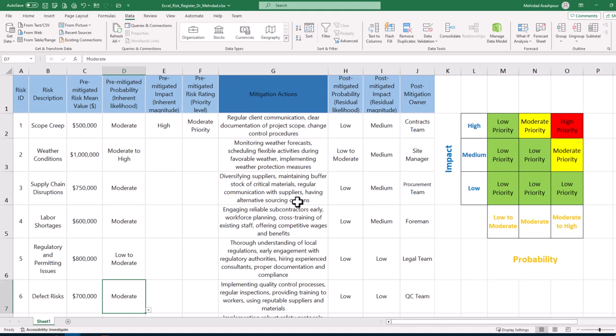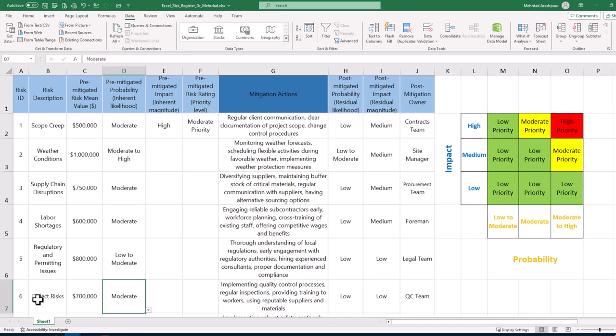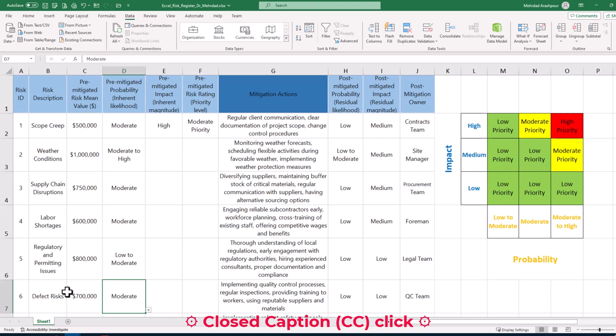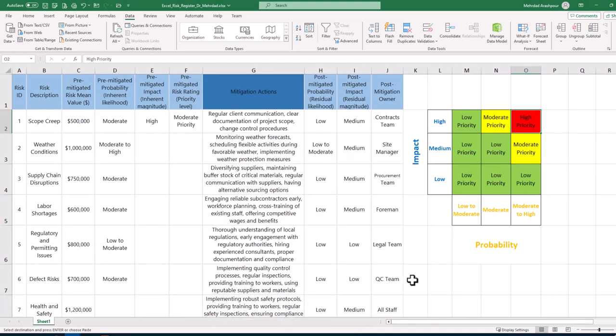This concludes the second step in building our dynamic risk register in Excel. Step 3 is to automate the calculation of risk ratings in the project risk register. So far, we have built the backbone of our risk register, but we may want to automatically calculate risk ratings based on the fever diagram or our risk matrix. For example, a high priority risk rating shown in red color is the product of moderate to high probability and a high risk impact.